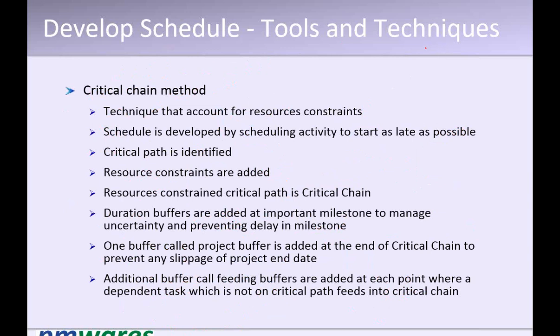And what he suggests is to manage the buffer. Always look at how much buffer is left. So you should not consume buffer before time, or keep a watch on the buffer. That will give you the trust of how much delay can happen on the project. If you are consuming buffer at a faster rate than you're supposed to, then your project end date is in danger.